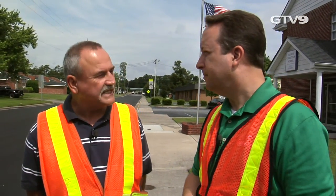We do a lot of base repairs, spot repairs, and base work, primarily on roads that are not to the point where you need to totally rebuild them, to help preserve them. And you can save more money by doing it at this stage rather than waiting till you have to completely rebuild the road. That's correct. It's costly because you get a lot of aging infrastructure in there, the water and the sewer, the storm drain. That ages as well and causes problems later on down the road. So it's really costly if you let them wait.